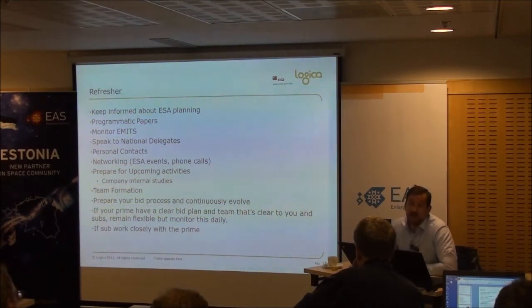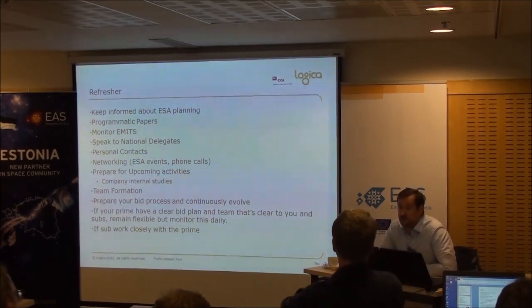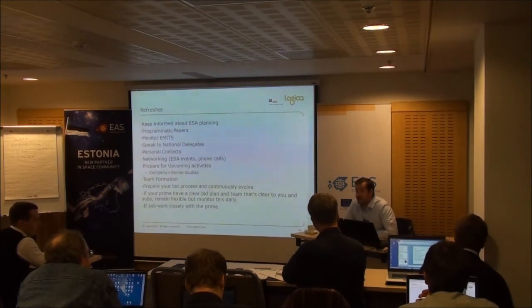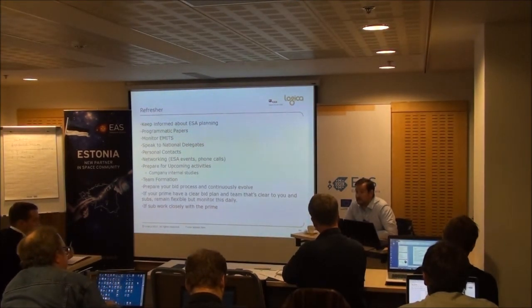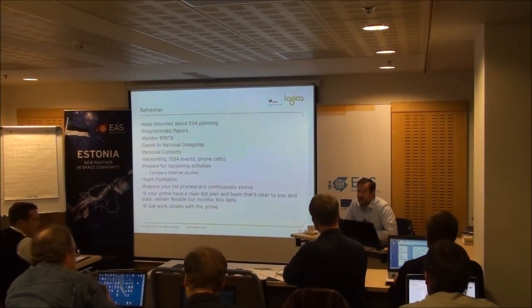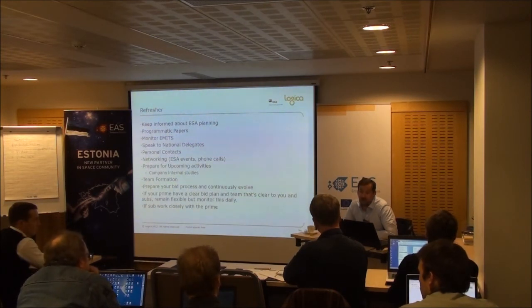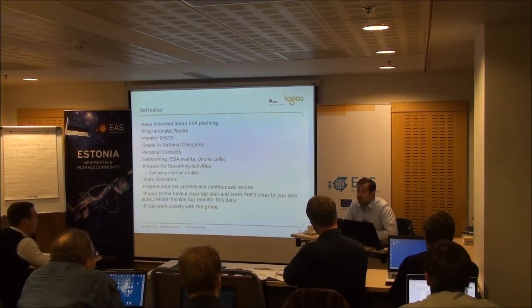It might be damages of some percentage of the overall contract. And that's why your commercial guys need to get cover of that contract early, so that they can hold over that and understand their risk, or the risk the organisation's under. Some contracts with ESA, be wary, they're unlimited. The damages can be unlimited.